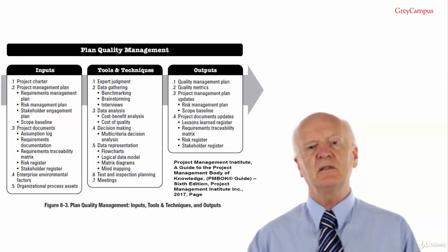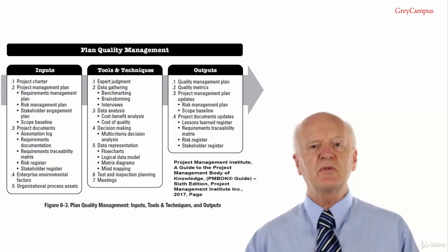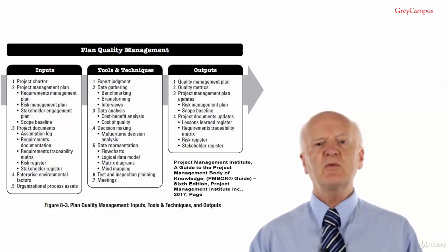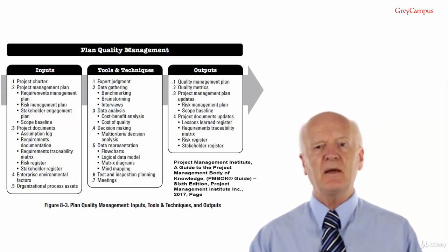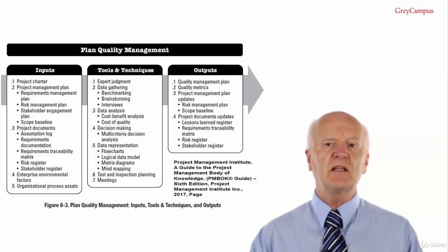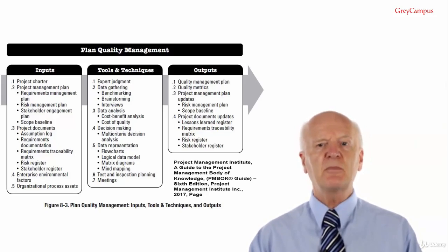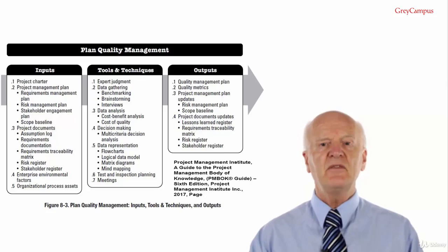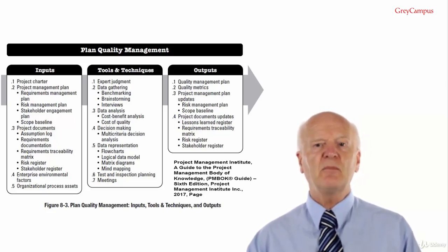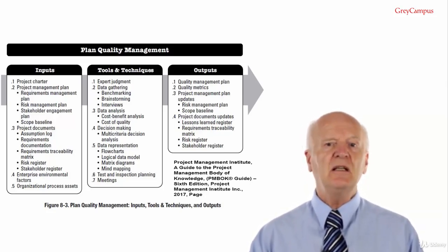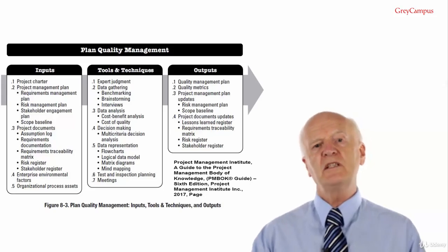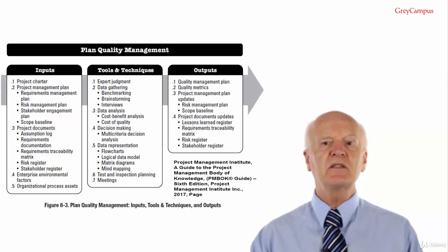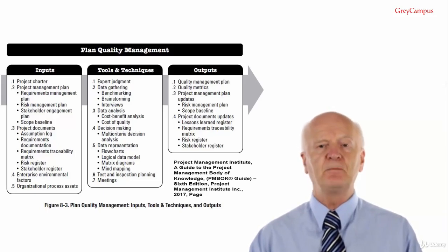Number 2, data gathering. Techniques that can be used for this process include benchmarking. The best way to know how good or bad your system is, is to compare it with another quality system on similar projects. And to be most effective, if possible, you should compare against projects in other organisations. This helps avoid experimental bias. E.g., if you only compare with other projects inside your own organisation, all of these projects may have the same weaknesses, and so they won't show up on your benchmark.